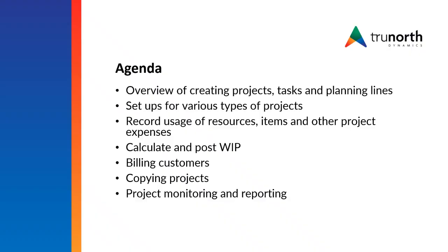We're going to talk about how to set up a project and what types of projects Business Central will track for you. Then we'll move over to creating transactions, recording transactions for usage. And if this is a WIP type of project, we're going to calculate and post WIP and take a look at that. Of course, we need to bill our customers, so we'll look at billing. And then there's going to come the time where you have to create a new project. And at that point, you may say, well, I wish I had a template. Well, Business Central doesn't have templates for their projects, but you certainly can copy an existing project. Makes it very easy to get like a level playing field there.